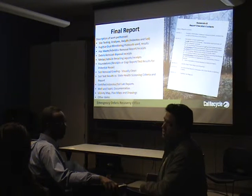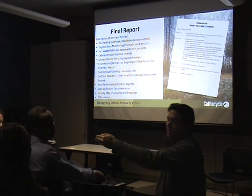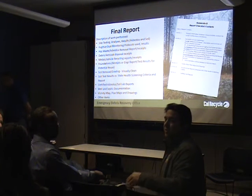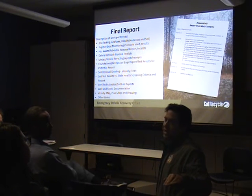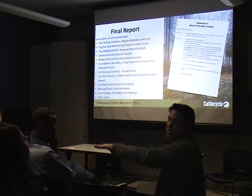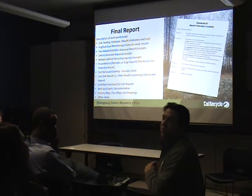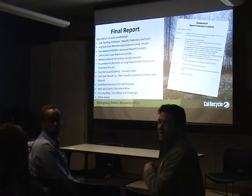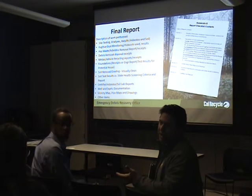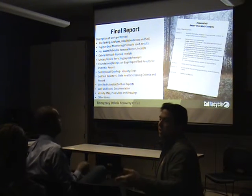There's a sample work plan that the county's published, and basically when you're applying and you have your application, you're stating that you're hiring contractors certified to do the work that's being performed. So if the work requires HAZWOPER certification, or if it just requires a general contractor's license because there is no hazardous waste component to it, it is in there. And in a sense, you are responsible for whoever you hire doing the work. We're not running license checks on contractors on your work plan. We're verifying that your work plan basically states you're going to hire someone capable of doing the work to the level that is necessary.